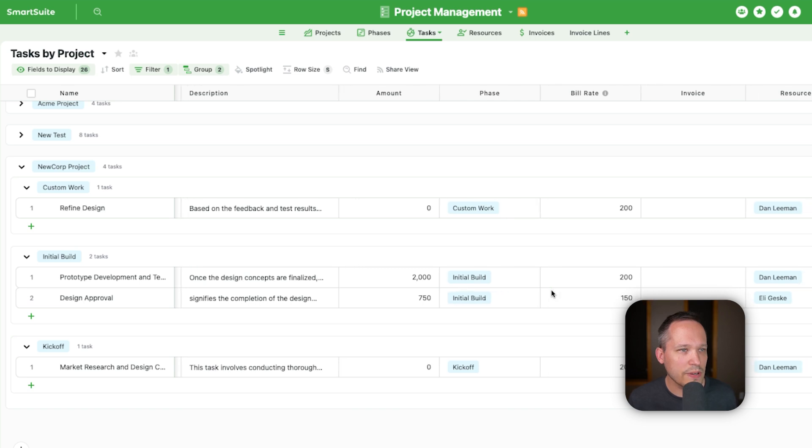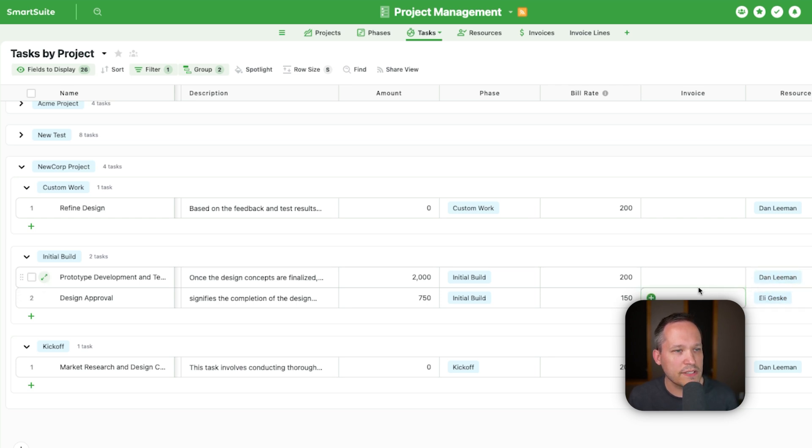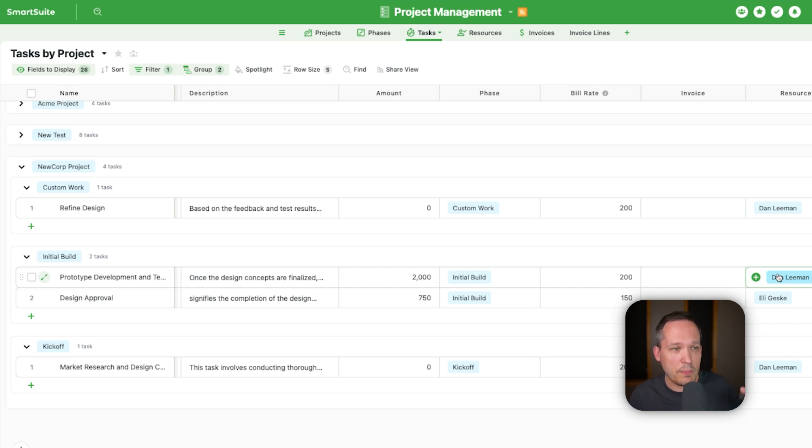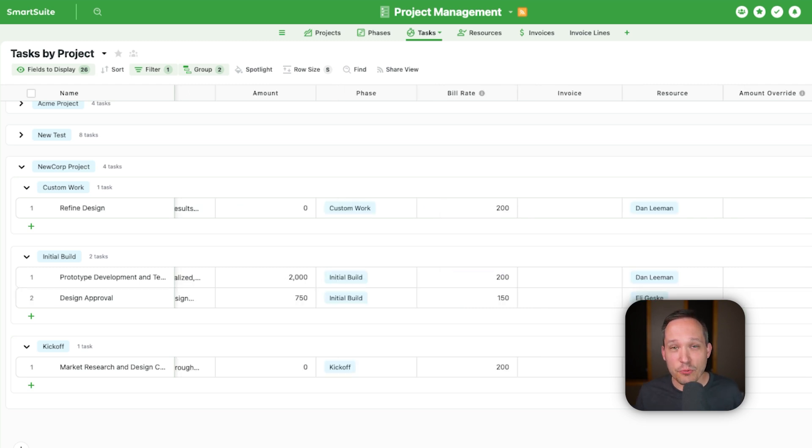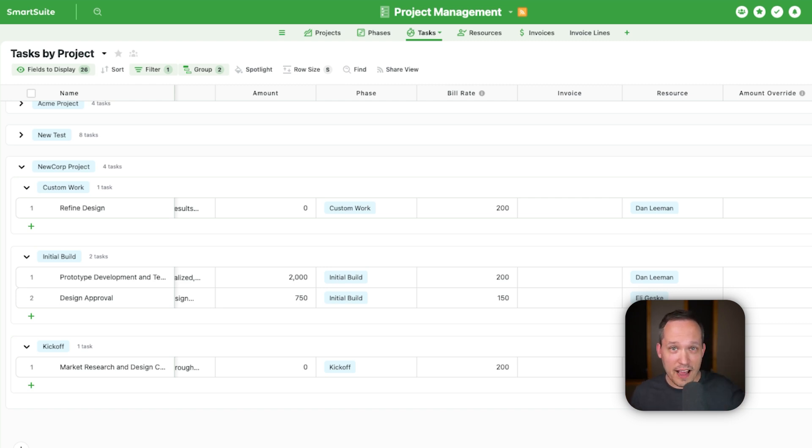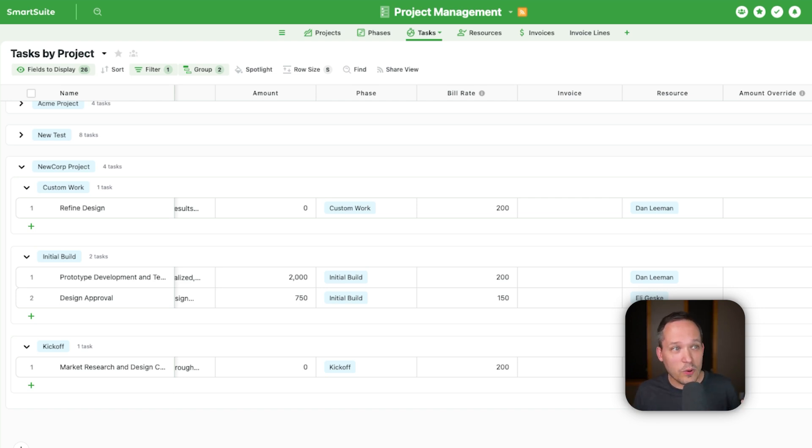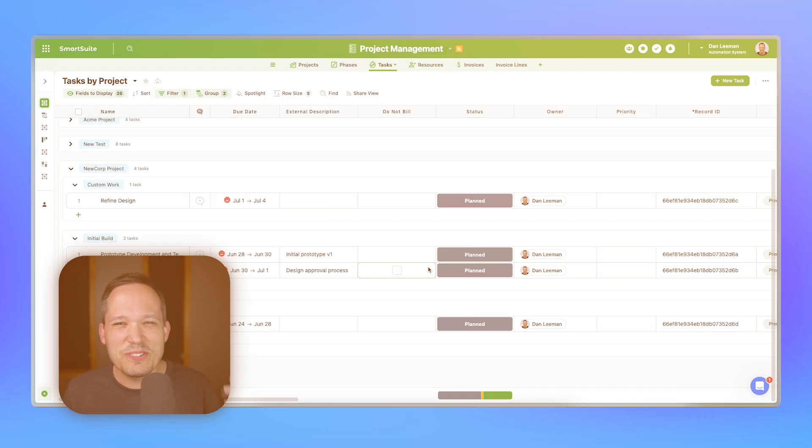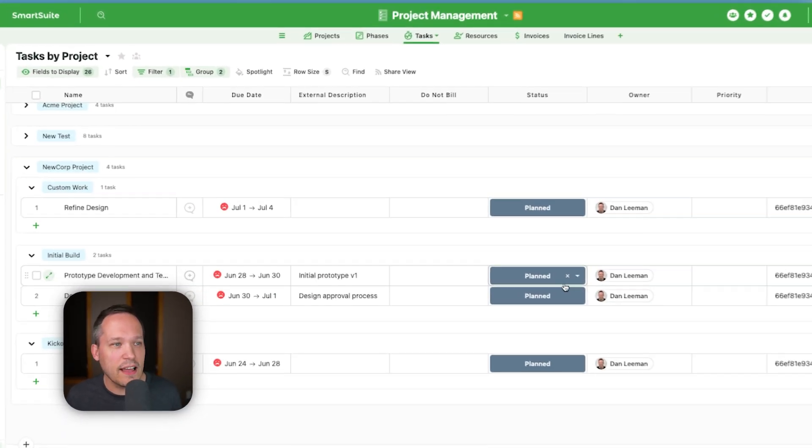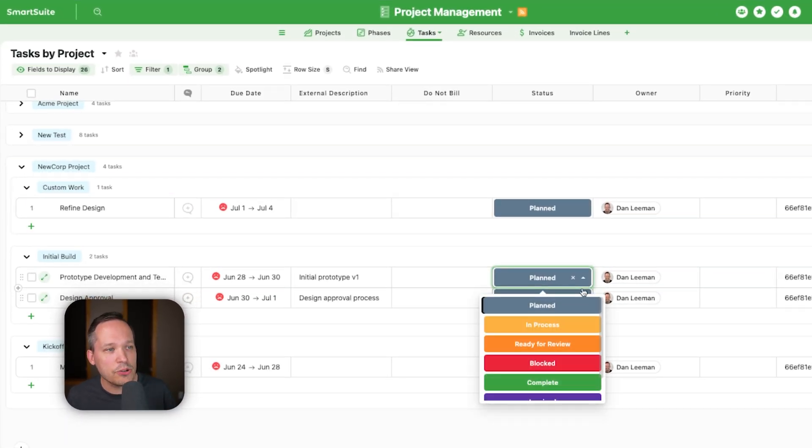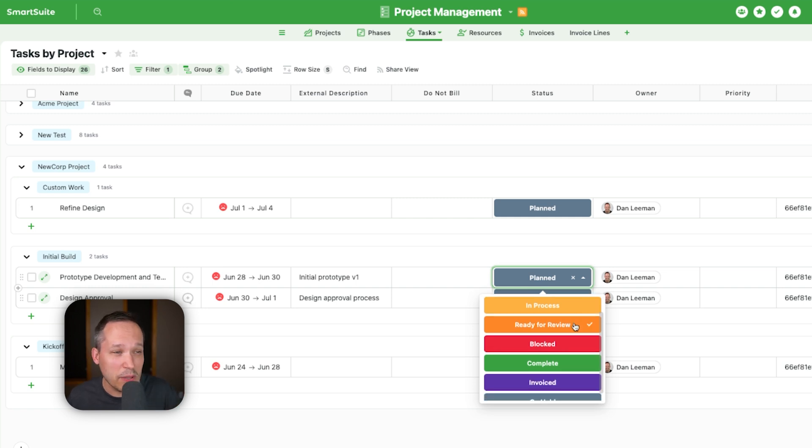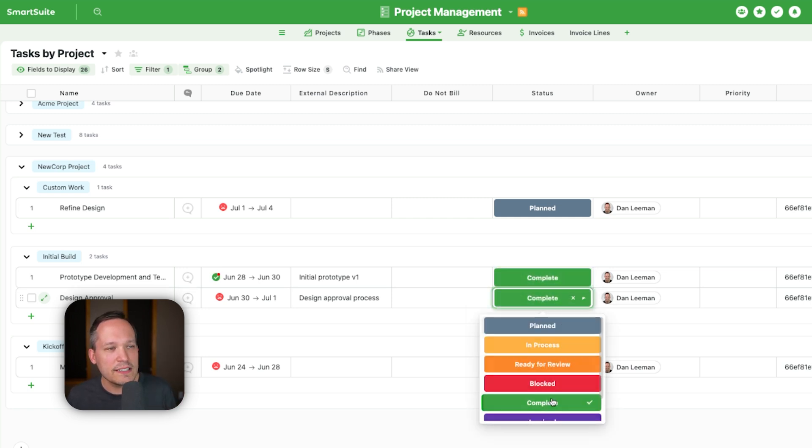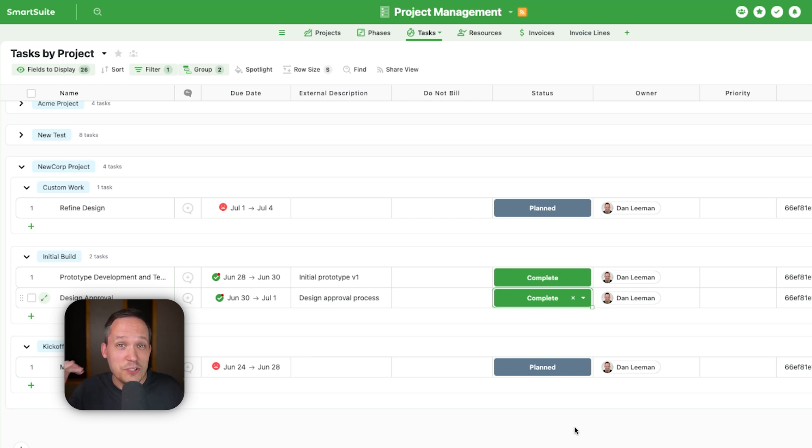So one of the things that we're able to do, we've got predecessors and successors and we could view these on something like a Gantt chart if we want to, to view all of our different dependencies. But just as we're looking here, the really key pieces that we're focused on are going to be around the billing aspects of this because we want to be able to send those invoices to our customers. So here let's say we've logged some time against these tasks already. Now one of the things that we can do is have different billing rates on this. So you can see here that we've got two different resources doing these different tasks. Each of them have their own different bill rate. And so by choosing a different resource, maybe we bill an architect at one rate and we bill a junior resource at another rate, we can certainly do that. Now why I bring up different rates is because some clients of ours have really specific billing needs around different resource rates. Others have a contracted rate or maybe it's even flat fee. So this needs to handle the complexity of different bill rates.